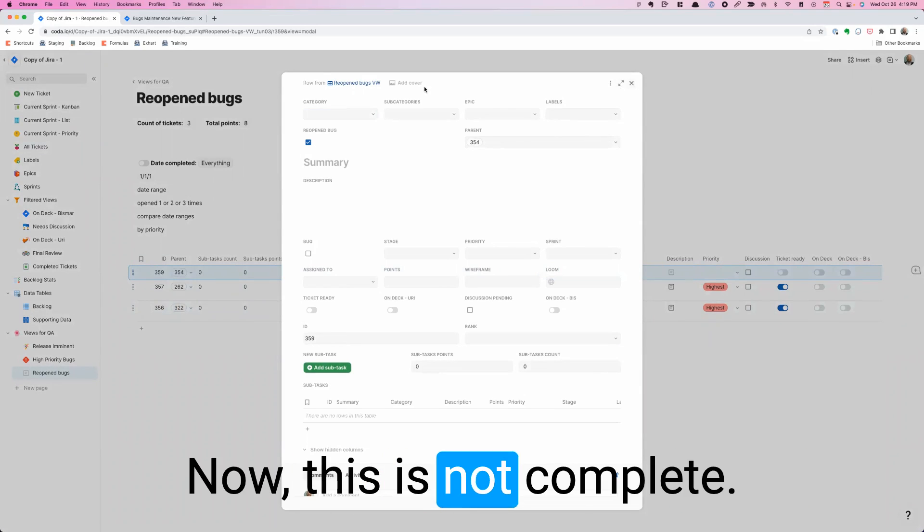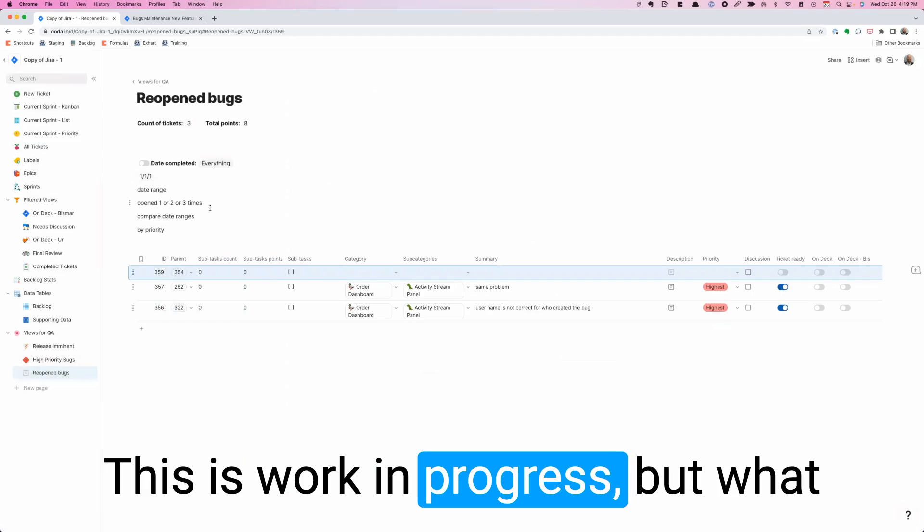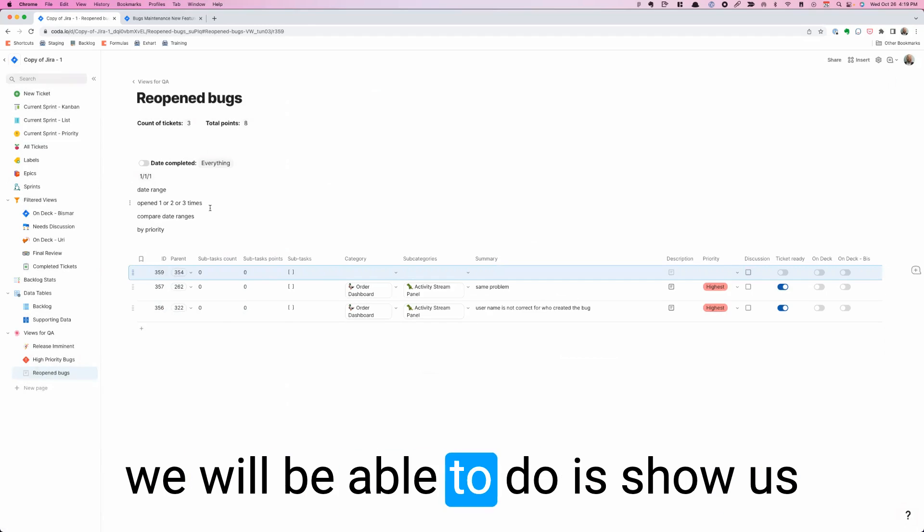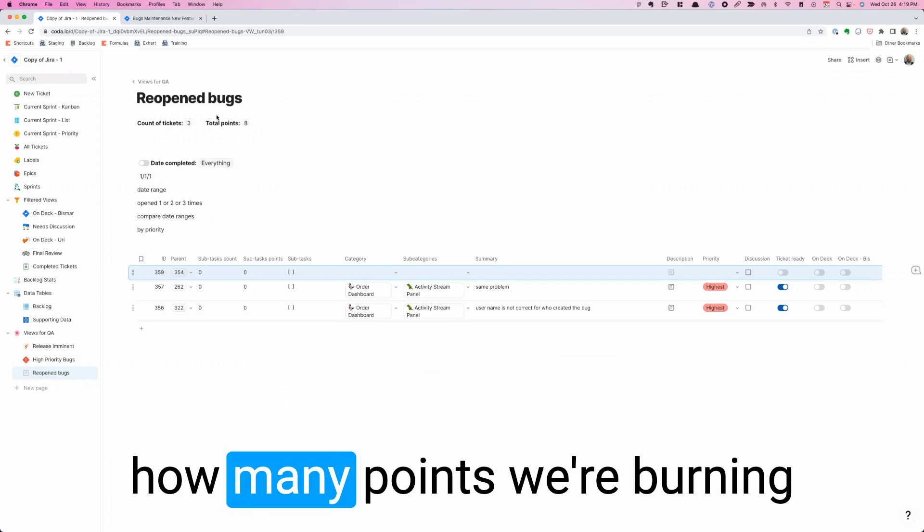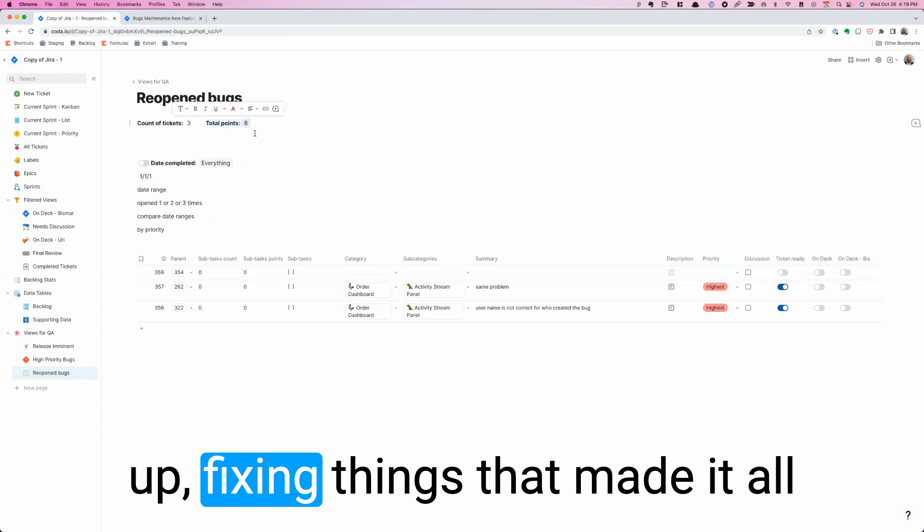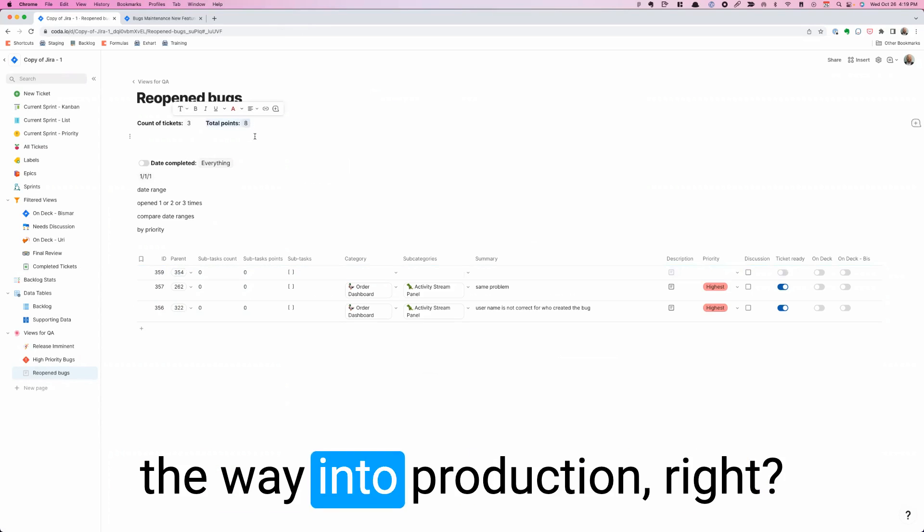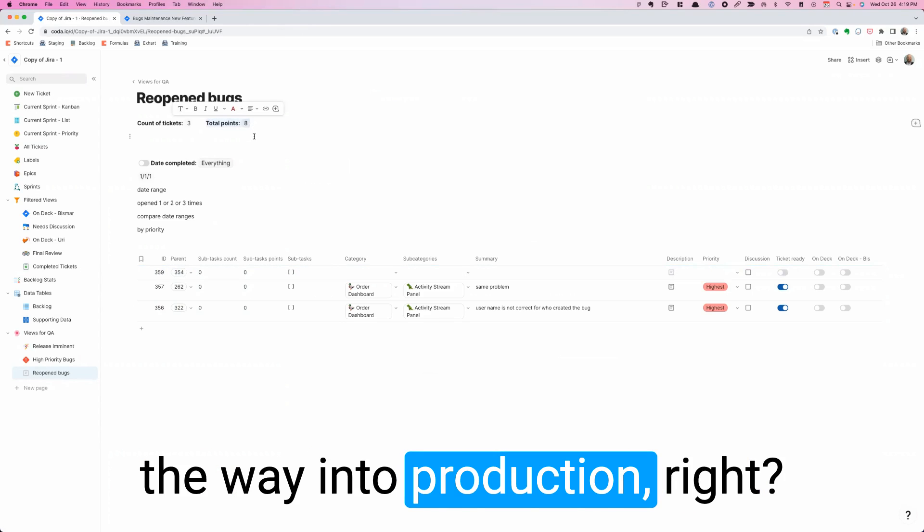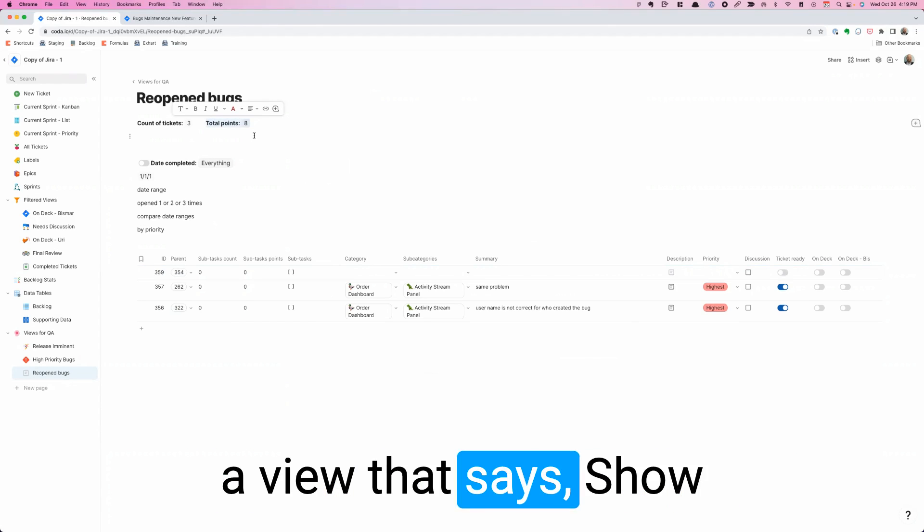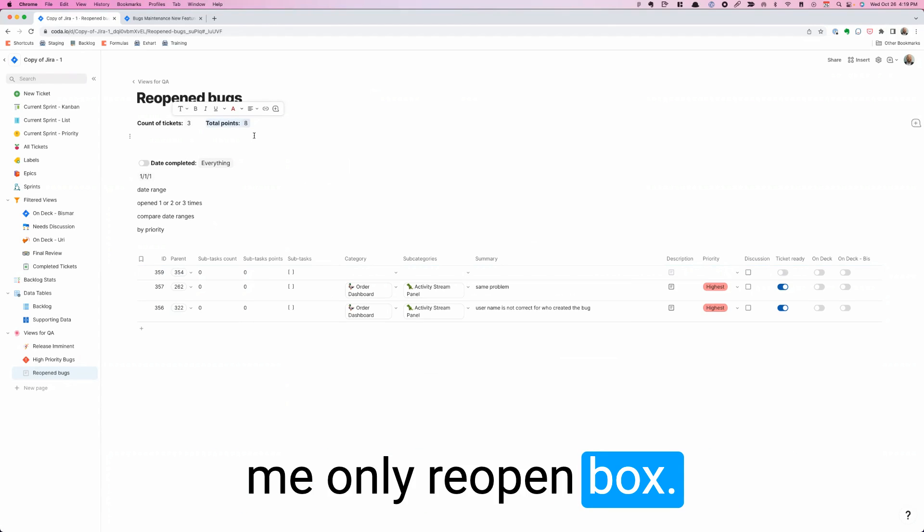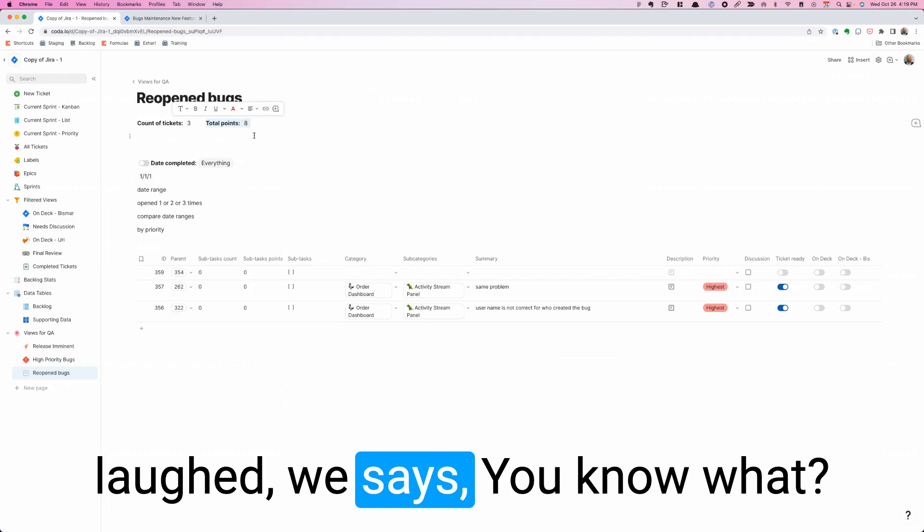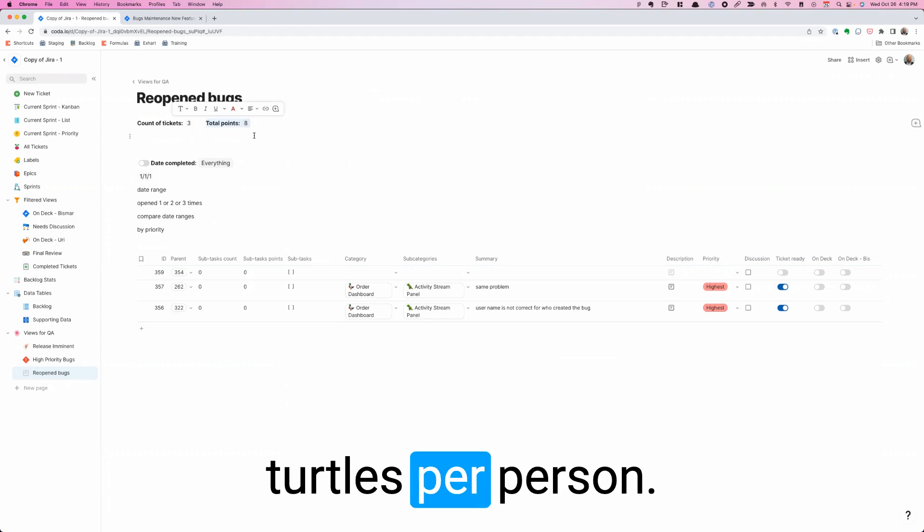Now this is not complete. As you can see, this is work in progress. But what we will be able to do is show us how many points we're burning up fixing things that made it all the way into production. Because I'll be able to do a view that says, show me only reopen bugs. And then not only that, we'll be able to run totals per person. We'll be able to say, how many of the different developers, how many of those things are we having to fix that made it all the way into production?